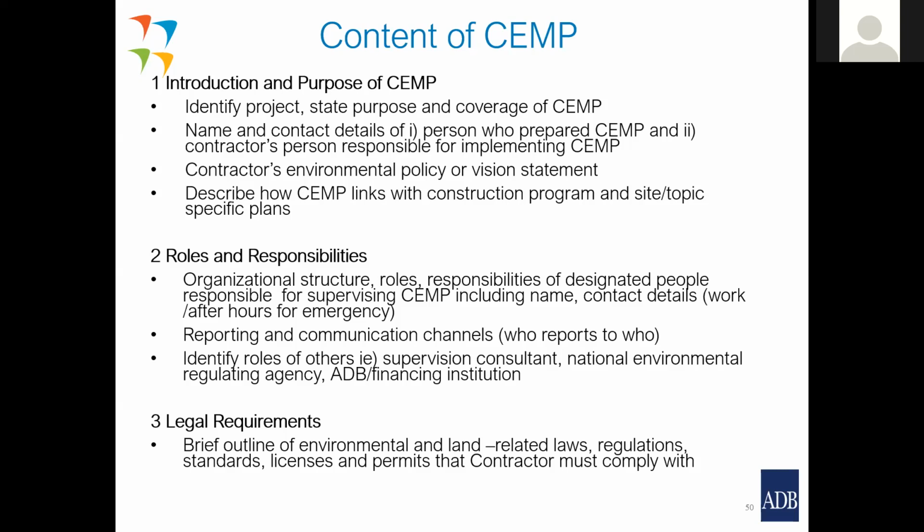Who reports to who? What's the line of command in the contractors? Who's dealing with the implementation of the CEMP and how are decisions made? We need to see that in a diagram. A contractor needs to identify roles of others, what the role of the supervision consultant is relative to the role of his own team, and how the National Environmental Regulating Agency fits in with monitoring what he's doing.